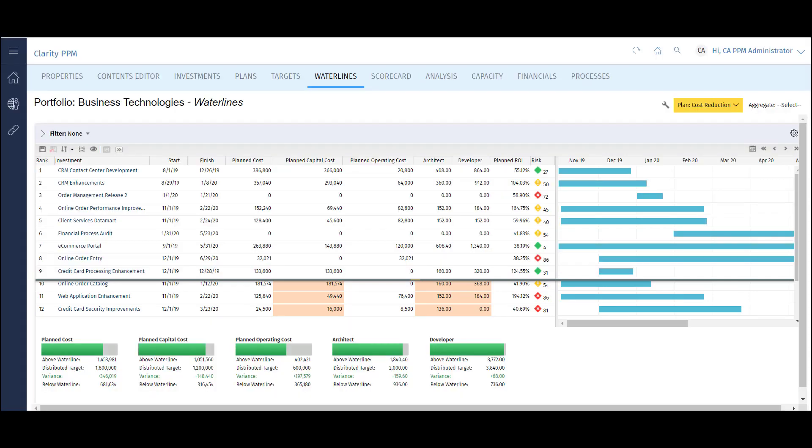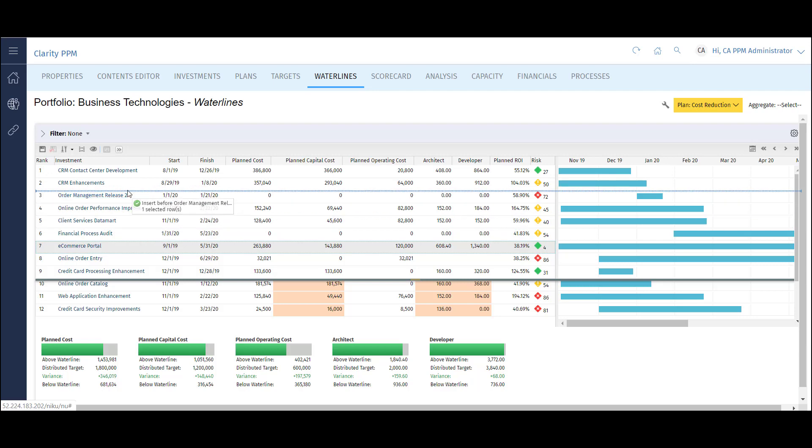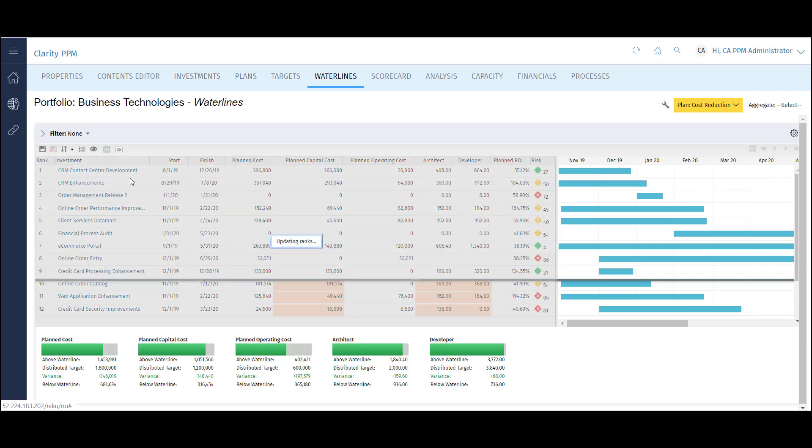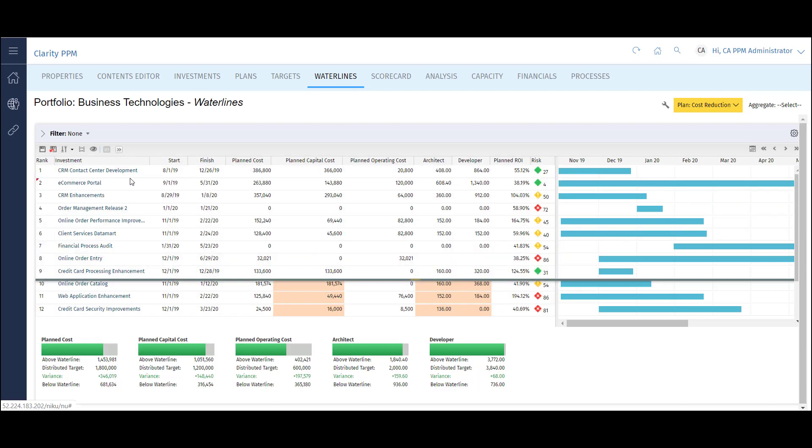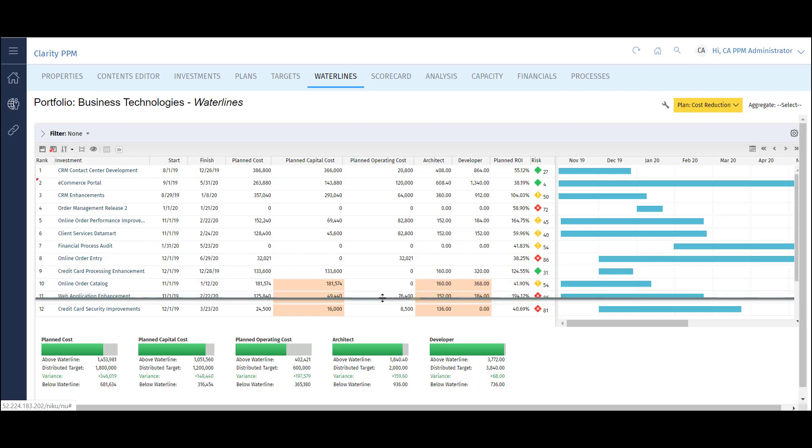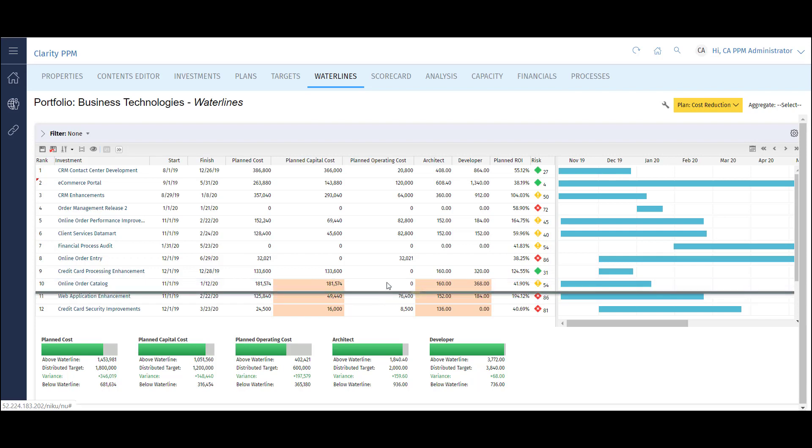We can prioritize this list by manually dragging projects to their appropriate rank. We can adjust the waterline to add the next project in rank to the planned work. This allows me to see the instant impact to my constraints. As I add online order catalog, my planned capital cost, architect, and developer constraints are exceeded.